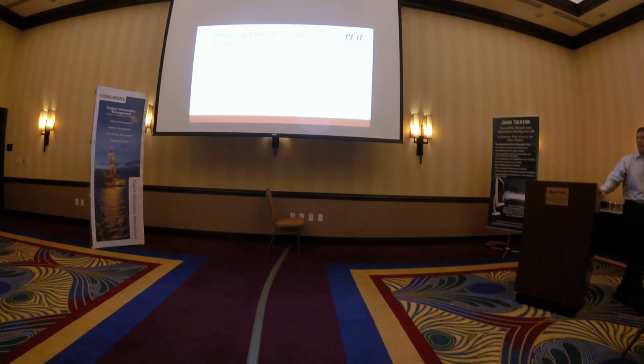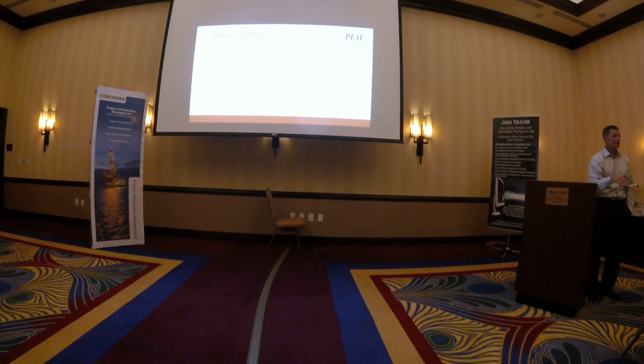Talk already about the schedule, monitoring progress. Make sure you've got your baseline schedule set, that you understand all the activities required, that matches with your WBS, and that you are also tracking a forecast or a progress schedule with forecast against your baseline, because then you can look at risk, you can look at cost and mitigation plans.